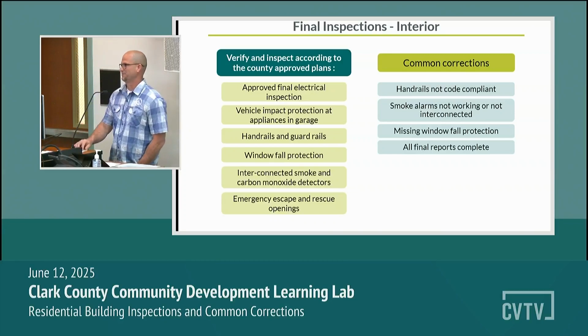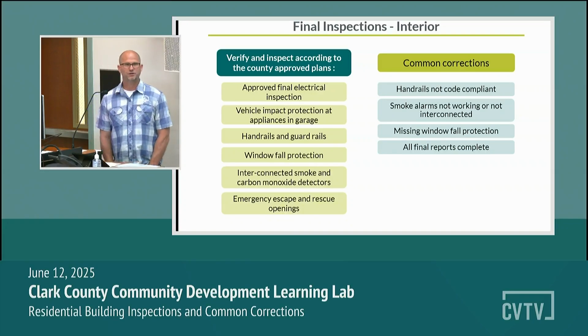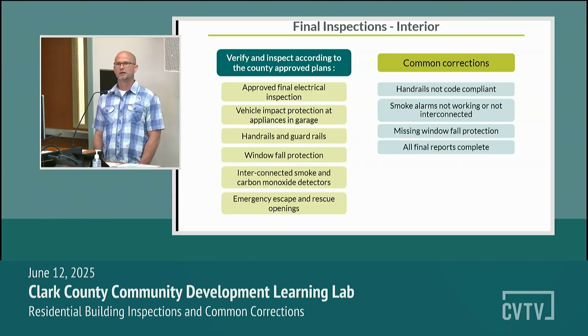Congratulations. This is a time that we're going to look at a few new things that may have been taken care of or done after the house was painted and textured and everything put in. And then there's a few other things that we're just going to verify again. We're going to come in and verify that final electrical has been taken care of. We're going to verify that maybe the fire marshal has signed off if you have fire sprinklers.